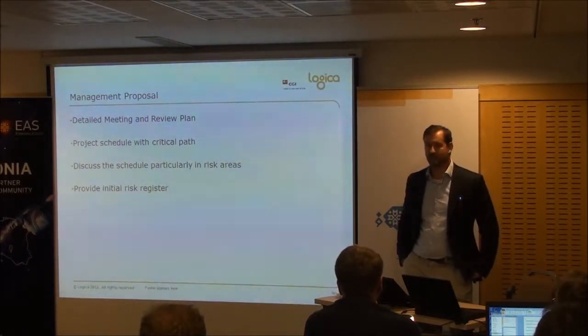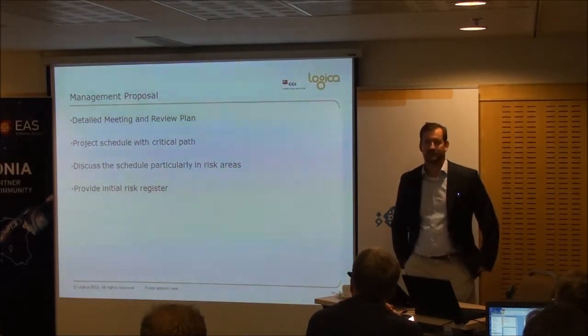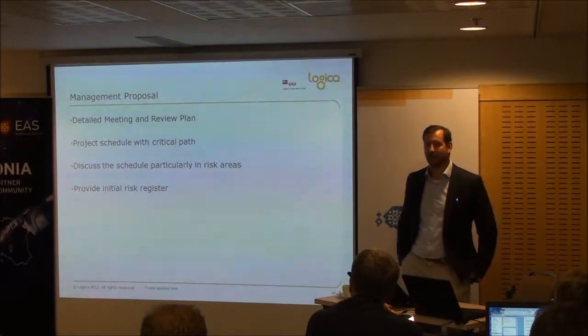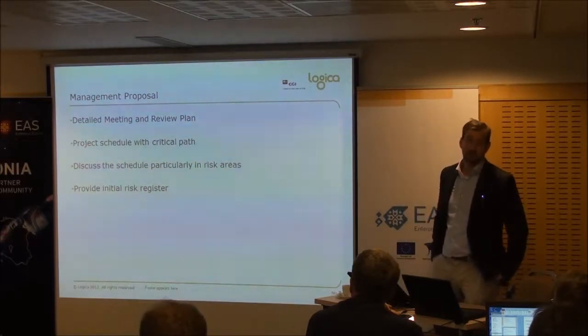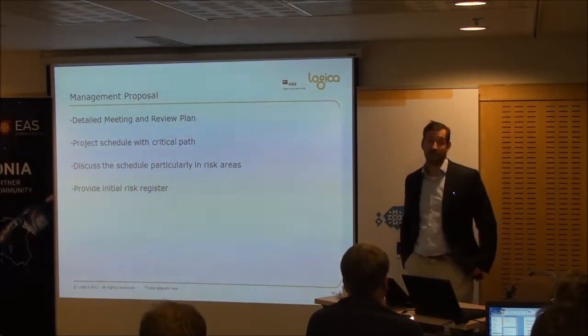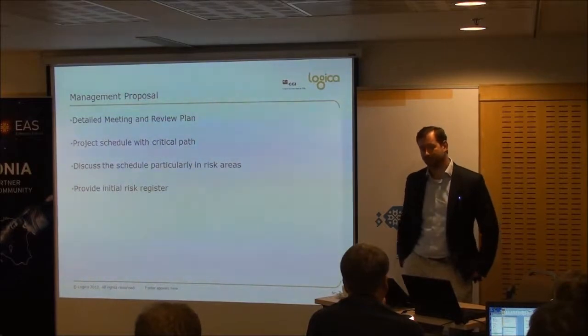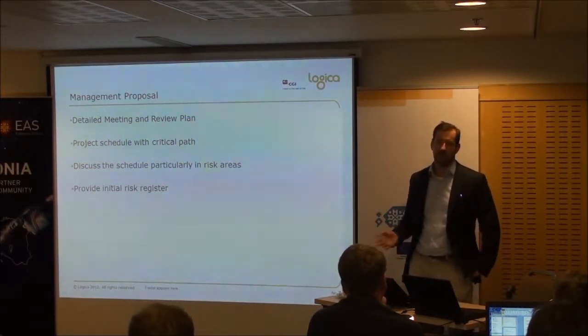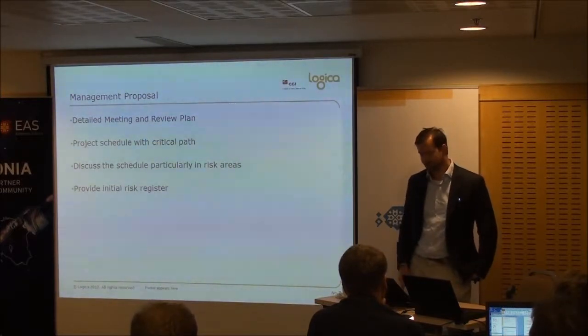A project schedule with a critical path, and not just a picture, some text around it, particularly focusing on where the challenges will be. If there are some critical parts where you're dependent on another piece, talk about them. Will you put some slippage in there? How will you counter that if there's a problem? Again, you don't need to go into massive depth, but focus on the value chain around that.